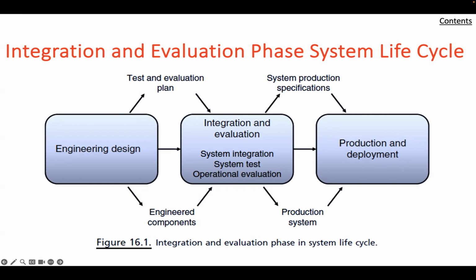The physical definition of synthesis steps corresponds to subsystem and system integration. The components have been implemented in previous phases. Then, thinking about systems integration, the typical activities that take place include integrating the test components into subsystems and the subsystems into a total operational system by sequential aggregation and testing of the constituent elements, and designing and building integration test equipment and facilities needed to support the system integration process and demonstrate end-to-end operation.